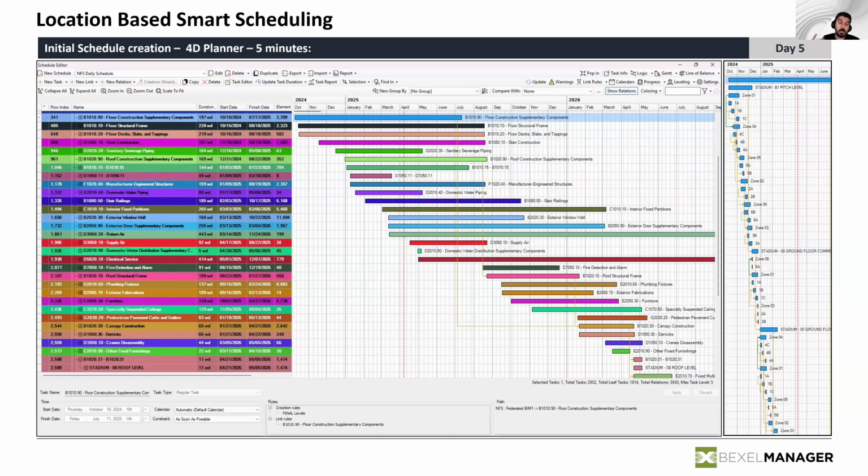And with this, of course, since this was a completely initial schedule study, the numbers were not really good. So we had huge oscillations. In one month, we execute like 20, 30 cubic meters of concrete per day in a certain area. In some other months, 300, 500, and so on. So we simply saw that we need some optimization.